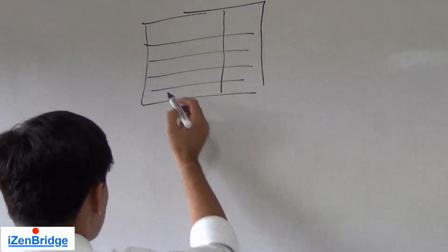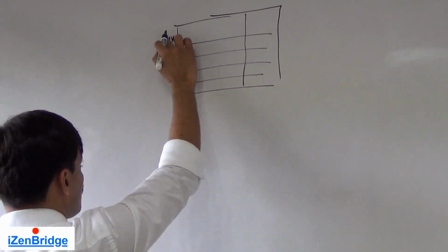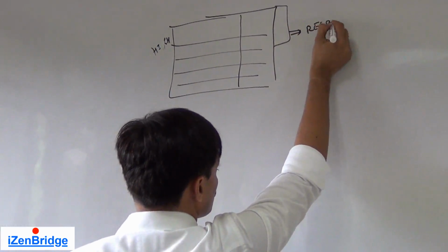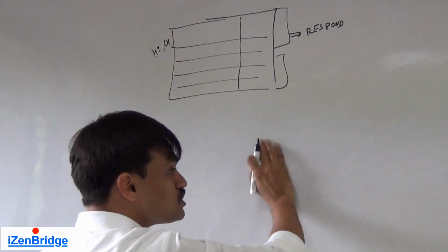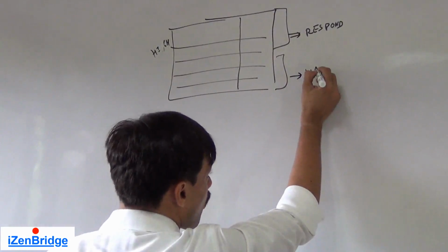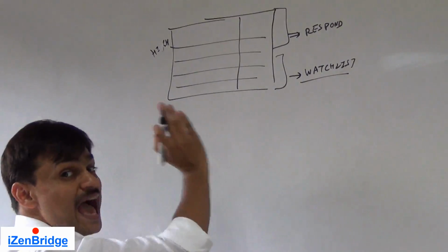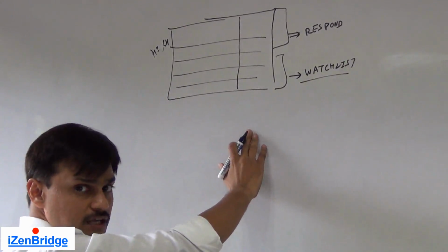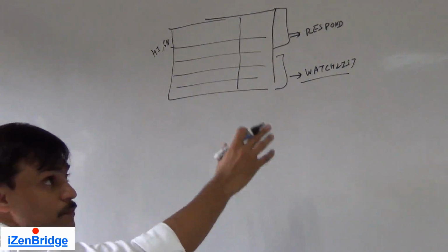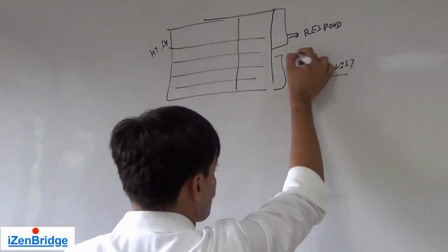The risks which are of high rank are the ones which need to be responded to. For the risks which are not that high in ranking, we may just leave them in a watch list. So they are the ones we are not doing anything for. We are just documenting them and subsequently we will review them. So the risk register becomes a primary input, the first input, for the plan risk responses process.